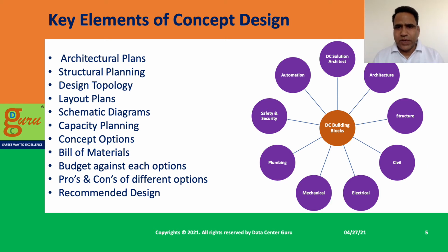In the conceptual design stage, we have to drill down into each and every building block, where the civil, structure, architecture, electrical and mechanical are concerned, in terms of sizing and average dimensions for each individual building block. Then we decide what topology we will use to put all these building blocks together, so that it gives an integrated outcome which meets our data center objectives, which we talked about in my previous slide.